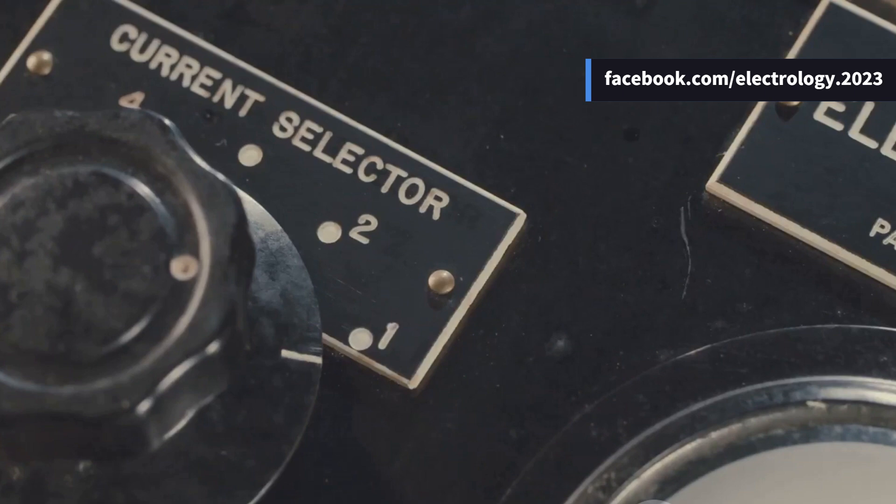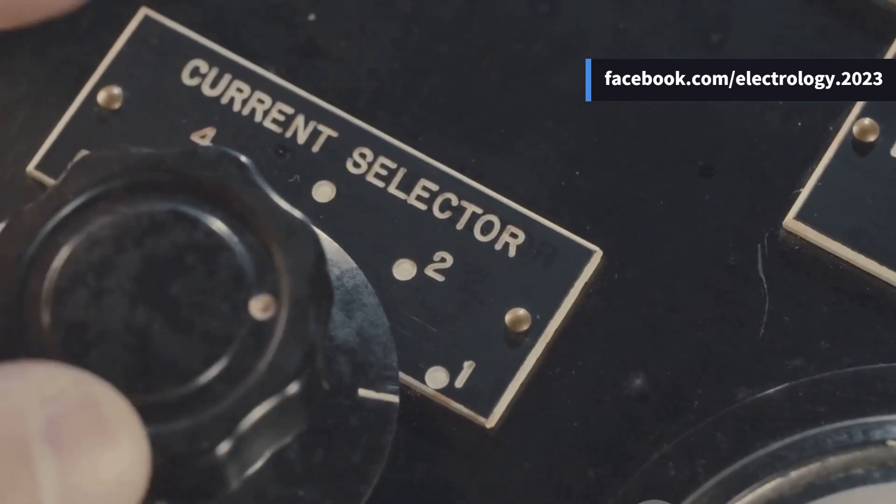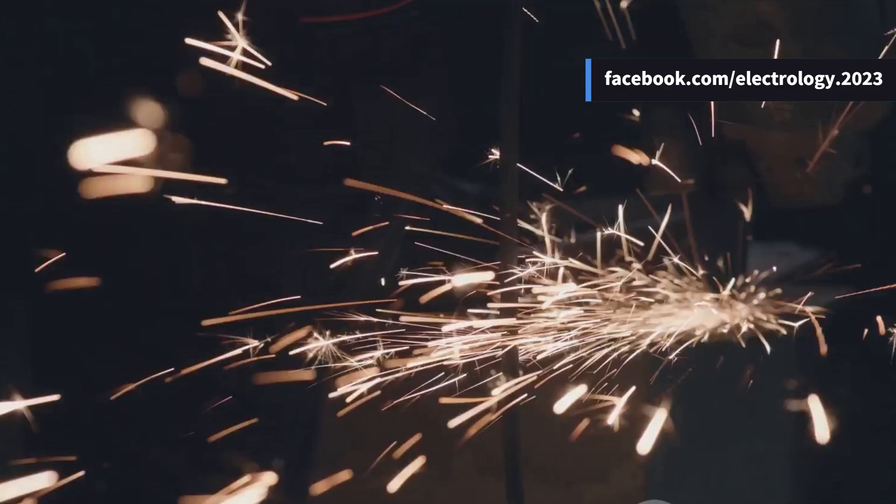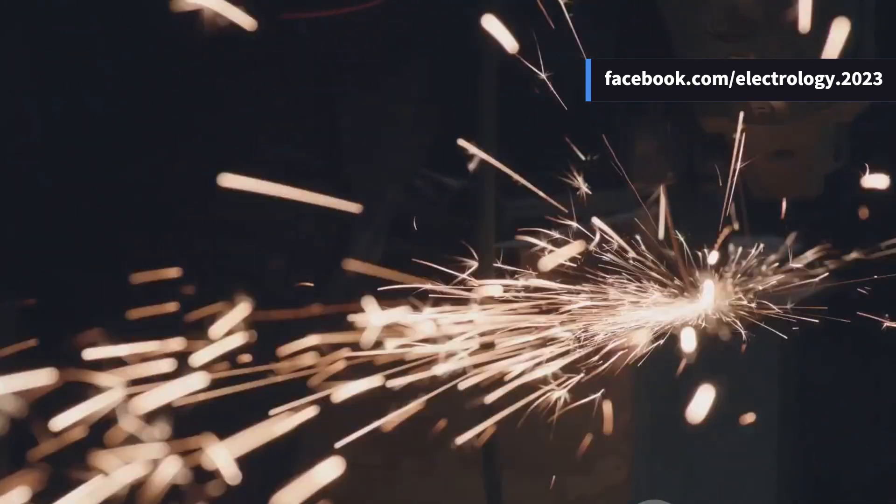Another major advantage of conducting a primary injection test is detecting loose connections. If there is a loose connection in the circuit, sparking may occur at the joint when the rated current is flowing during the primary injection test.